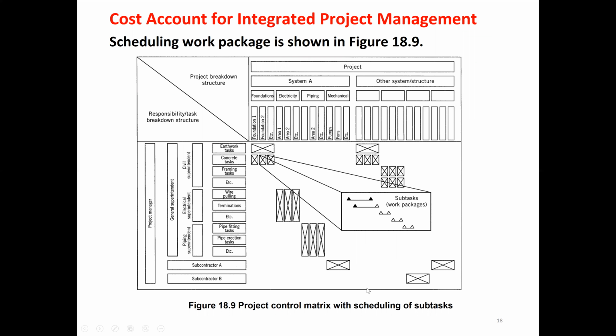So we divide the project into systems, and under the system into foundations, electricity, piling, mechanical, and here on the responsibilities breakdown structure: project manager, general supervision, piping superintendent, electrical superintendent, civil superintendent, and then subcontractors.